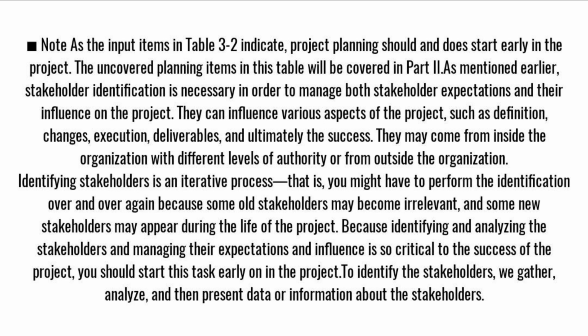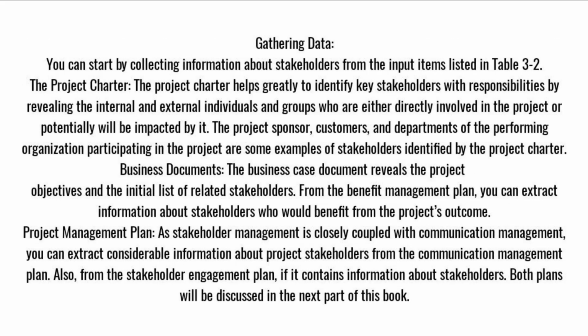Identifying stakeholders is an iterative process, that is, you might have to perform the identification over and over again because some old stakeholders may become irrelevant, and some new stakeholders may appear during the life of the project. Because identifying and analyzing the stakeholders and managing their expectations and influence is so critical to the success of the project, you should start this task early on in the project. To identify the stakeholders, we gather, analyze, and then present data or information about the stakeholders. Gathering data. You can start by collecting information about stakeholders from the input items listed in Table 3.2.